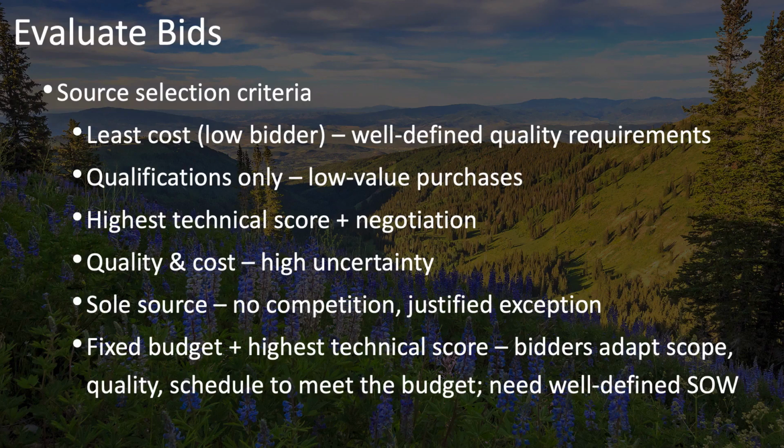Then you have sole source, and that's when you pick someone and ask them for a bid. So there's no competition involved, and because this can be so easily abused, this needs to be justified, and it needs to be the exception rather than the rule. And your organization will probably have some very specific guidelines and limits on when you can use a sole source approach.